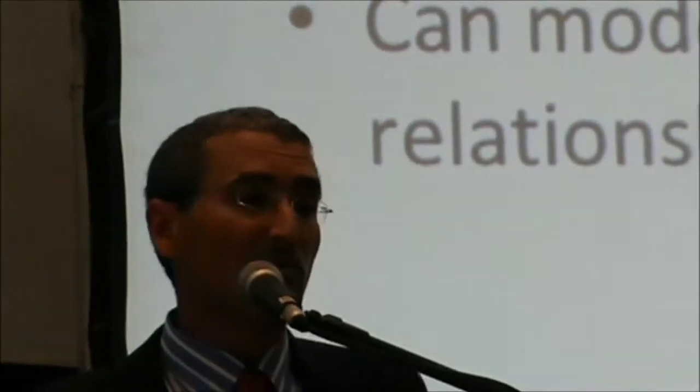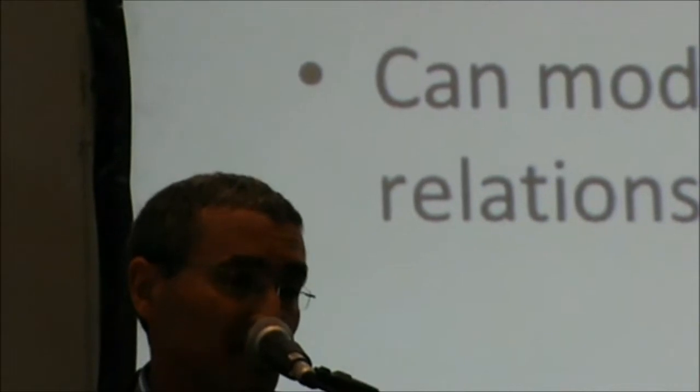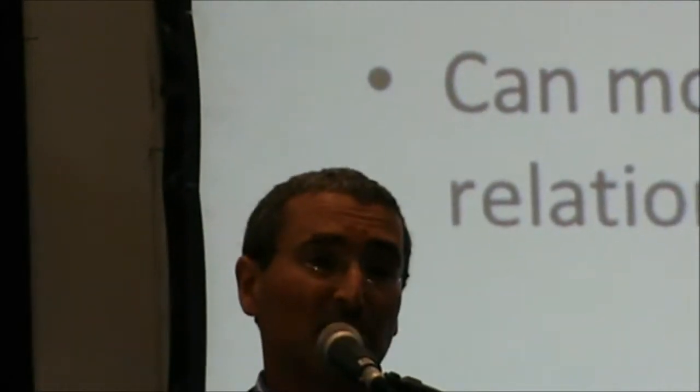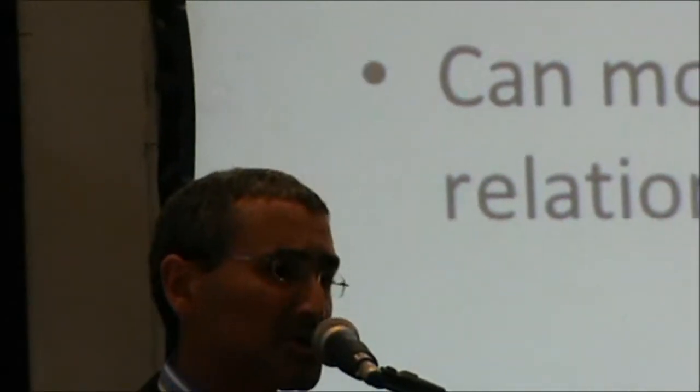So if we summarize discrete event simulation, we can say that it's a very effective way to model construction operations. We can model the stochastic nature of events, even the chaotic nature of events, and we can model very complex relationships. They don't have to be simply finish-start or start-start or such things. They can be dependencies on equipment, dependencies on material, flows of information, and all sorts of other things.